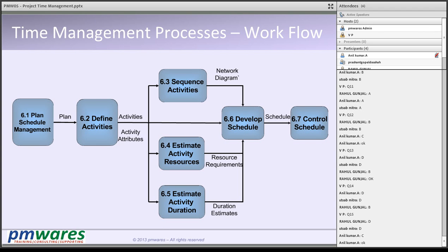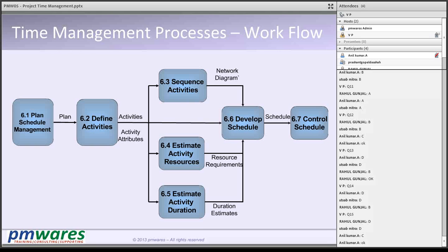Once you identify and sequence activities, the third step is to estimate the resources. For every activity, you estimate what type of resources are required, what skills are needed, and how many are available — you may require ten but only two are available, so you work with two. Based on this, you estimate the duration of each activity: how long each activity will take. We put all these things together to produce the project schedule, then apply optimization techniques. CPM is one technique to look at the critical path and see how we can shrink or expand it depending on our timeline, optimizing resource utilization to achieve the minimum delay.